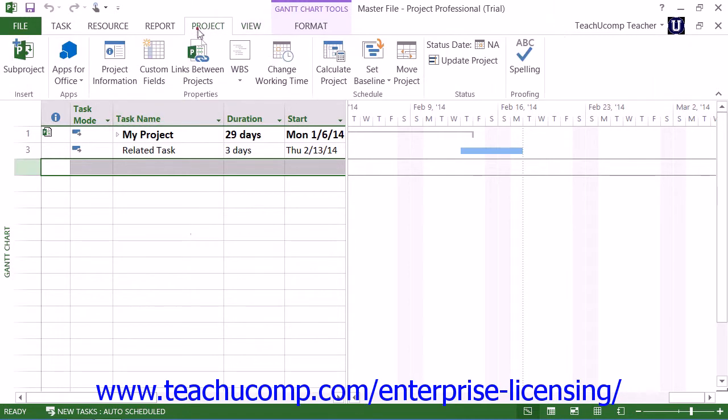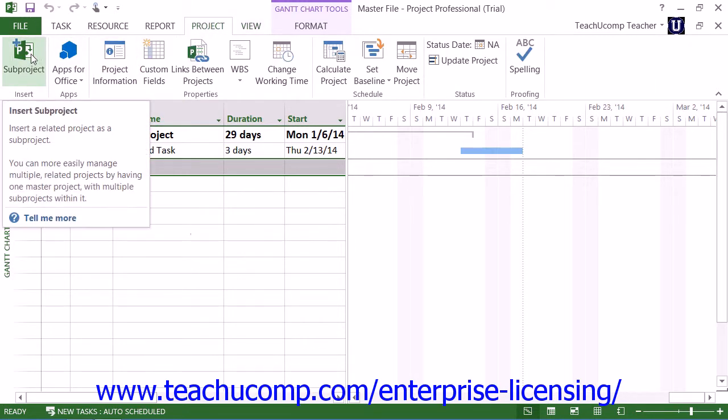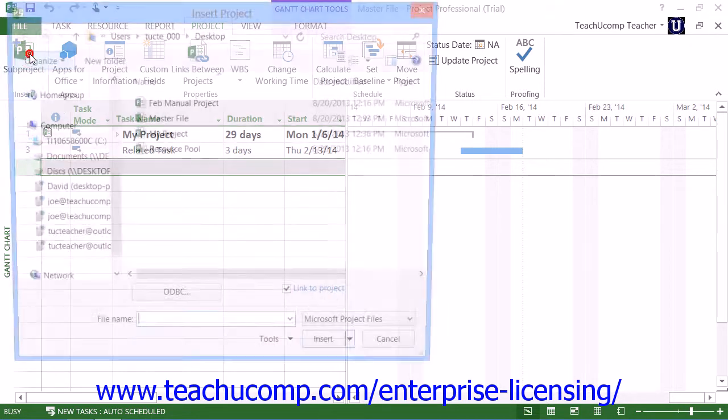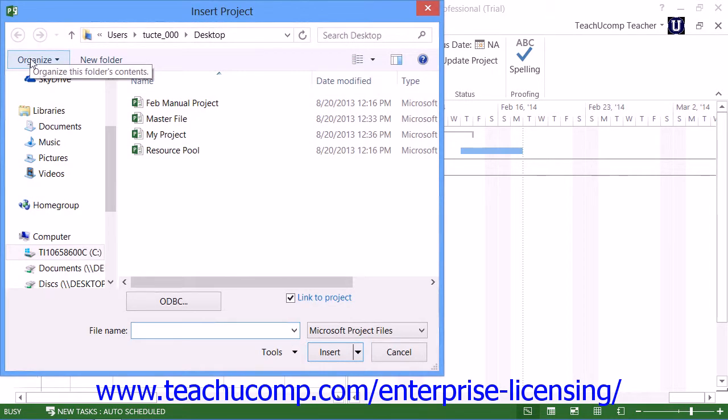Next, click the subproject button that appears in the insert button group on the project tab within the ribbon to open the insert project dialog box.